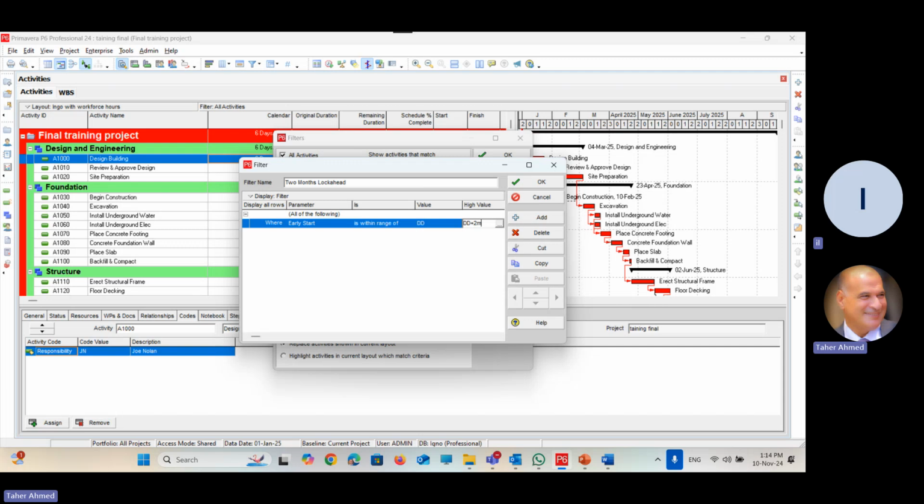In this case, I'm connecting the filter with something that can be moved. So this filter can be used now, and it could be used next month, and the month after, and so on, because it moves when the data date moves. Don't select a customized date to create a time filter. Use something that changes with time, because this technique will keep the filter valid for the whole time of the project, not only for those dates. Is it clear?